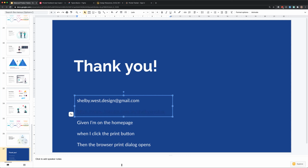versus a 13. And so that's where we find the really easy to understand definitions of 1, 2, and 3 make it way easier to get the entire team pointing consistently and having that conversation, rather than saying, well, I pointed at a 2 because of this really small thing versus I pointed at a 1 because I've done that before. The t-shirt sizes help us have the conversation around the actual complexity of the work versus why a 1 and a 2 are different, which I have had many times over the years with teams.